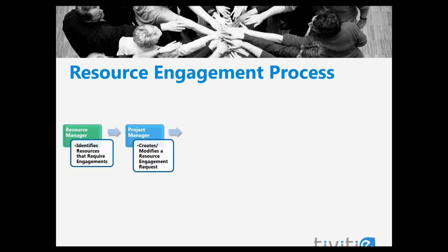Then project managers will create resource engagements for the resources to work on their projects. The project manager will create and submit an engagement request for each needed resource that requires one. The project must be published before engagement requests can be created. Depending on the processes defined for your particular organization, not all resources may require engagements. All submitted resource requests will be visible to the resource manager in PWA.